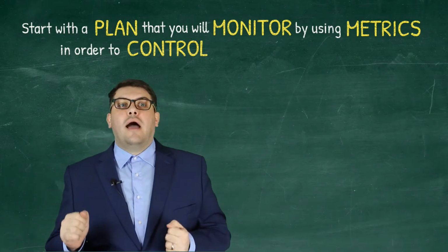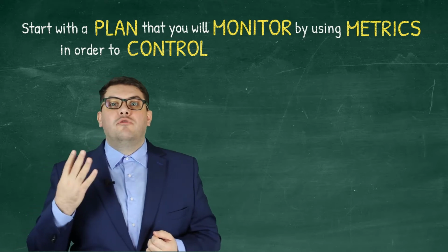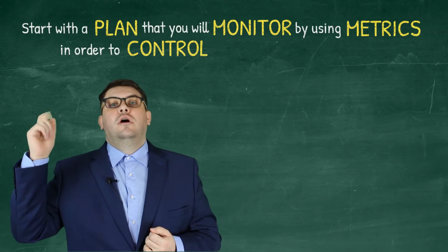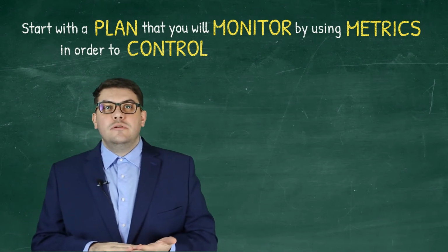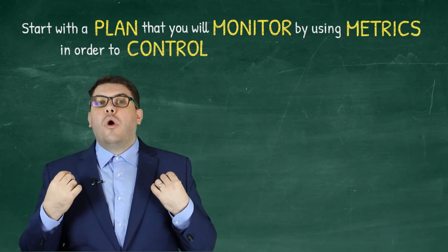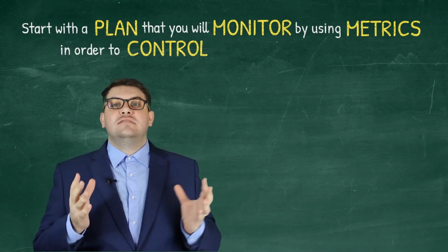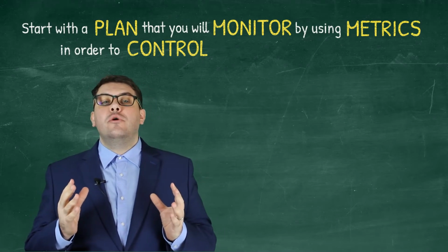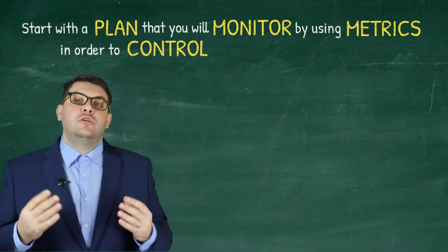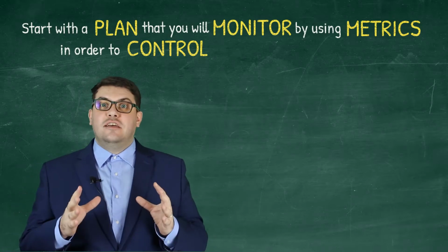Now, let's go back. Test planning. Test planning applies for each of the 4 test levels that we discussed in the previous video, and you can check the link above for a shortcut to that session. And it should also cover what you want to do, how you want to do it, what is the schedule, and how you are going to monitor that schedule. It's very important to also include the metrics and the way that you are going to monitor and control the plan during the test planning session.